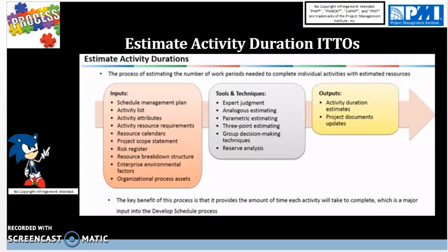It uses statistical relationship between historical data and other variables to calculate an estimate for activities such as cost, budget, and duration. So in this case, you can use that South Dallas 2-floor condo example I just gave. Here, instead of it being similar in terms of size, weight, and complexity, you have to ignore that and just compare the data, the actual information, parameters as an example to build another 2-floor townhouse, but you don't have to compare it to the similar budget or complexity or weight. That's the difference between parametric and analogous estimation.